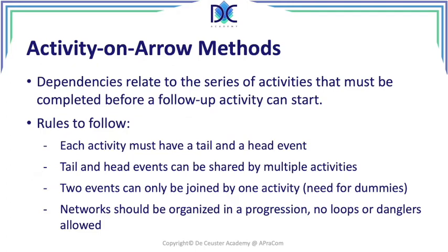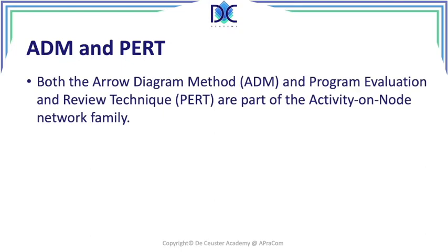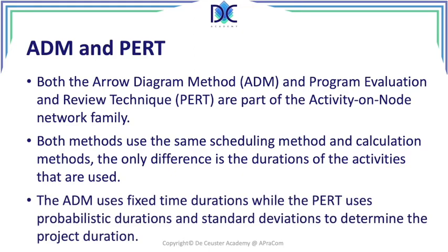Both the arrow diagramming method and PERT are part of the activity on arrow network family. Both methods use the same scheduling technique and calculation method. The only difference between the two is the duration of the activities used: the arrow diagramming method uses fixed time durations, while PERT uses a probabilistic approach to durations, including the expected duration and a standard deviation for each activity, and finally for the project, to determine the overall project duration.